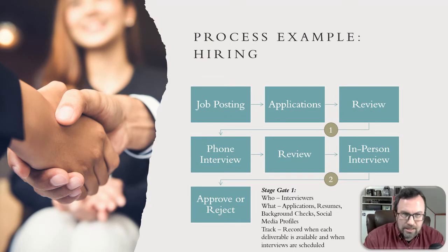So let's take stage gate 1 here, for example. If we take our definition from earlier, well, we have to know who. The people responsible for transitioning through stage gate 1 are the interviewers. To do the interview, they have to have the applications in hand. They have to have the resumes in hand. They have to have the background checks that were to be done. They have to have the social media profiles maybe that were dug up. All of those pieces have to be in place before you can cross that gate and start to schedule the